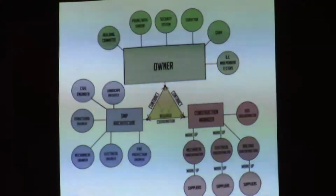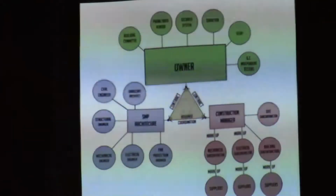Have a geotechnical engineer come to do borings where the addition's going to go to determine what the subsoil conditions are, what the bearing capacity is, and all of that with the revised site plans will direct the design team of where we can go and what we will need to do to work within the site and within the budget, because we have a goal of 1.92 and that's it.